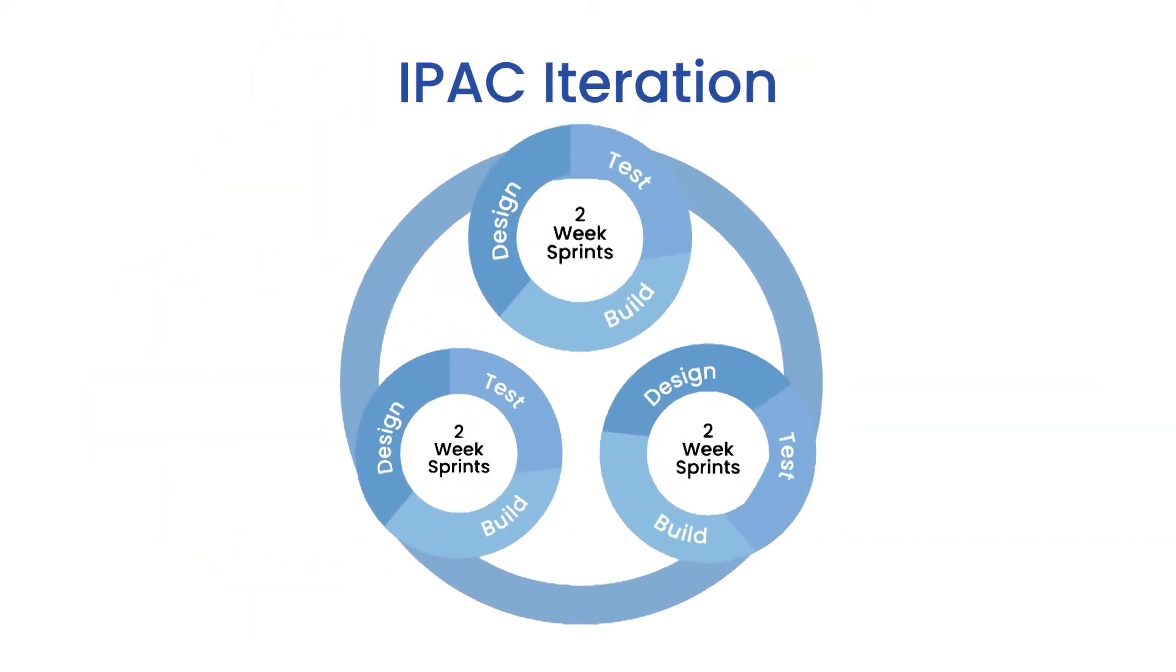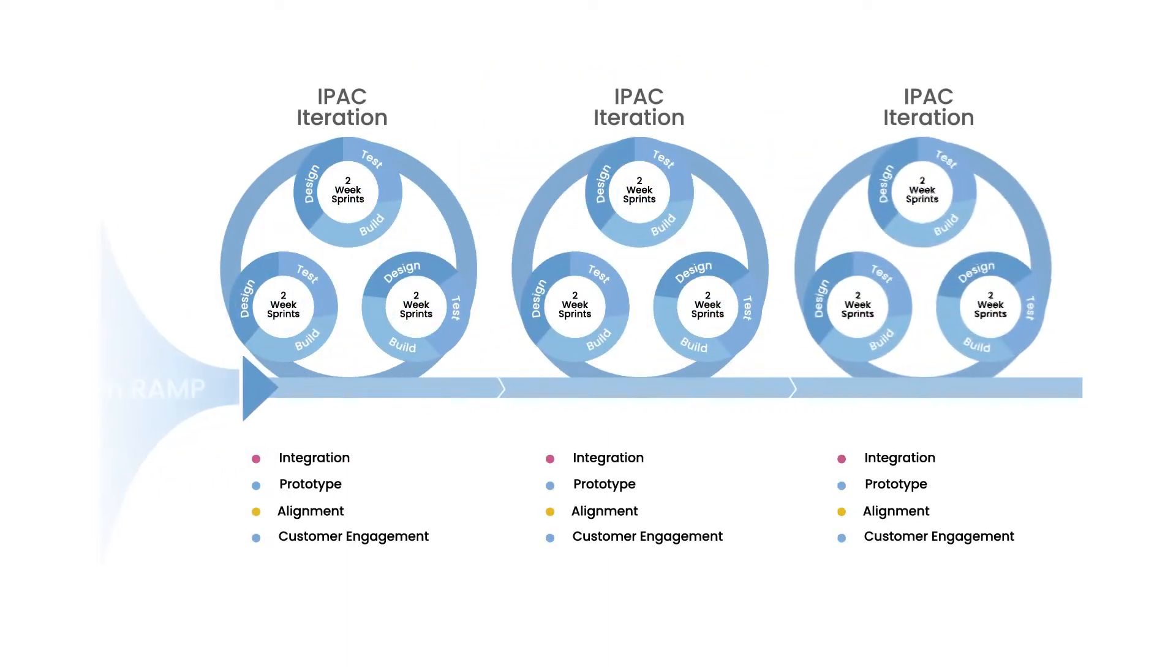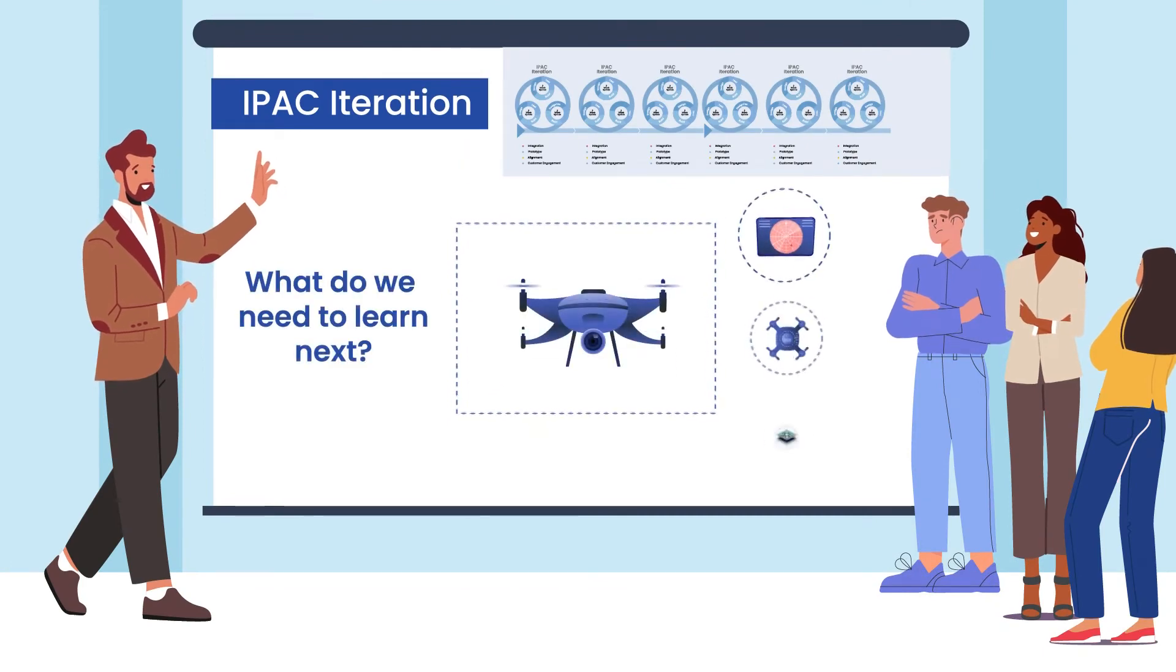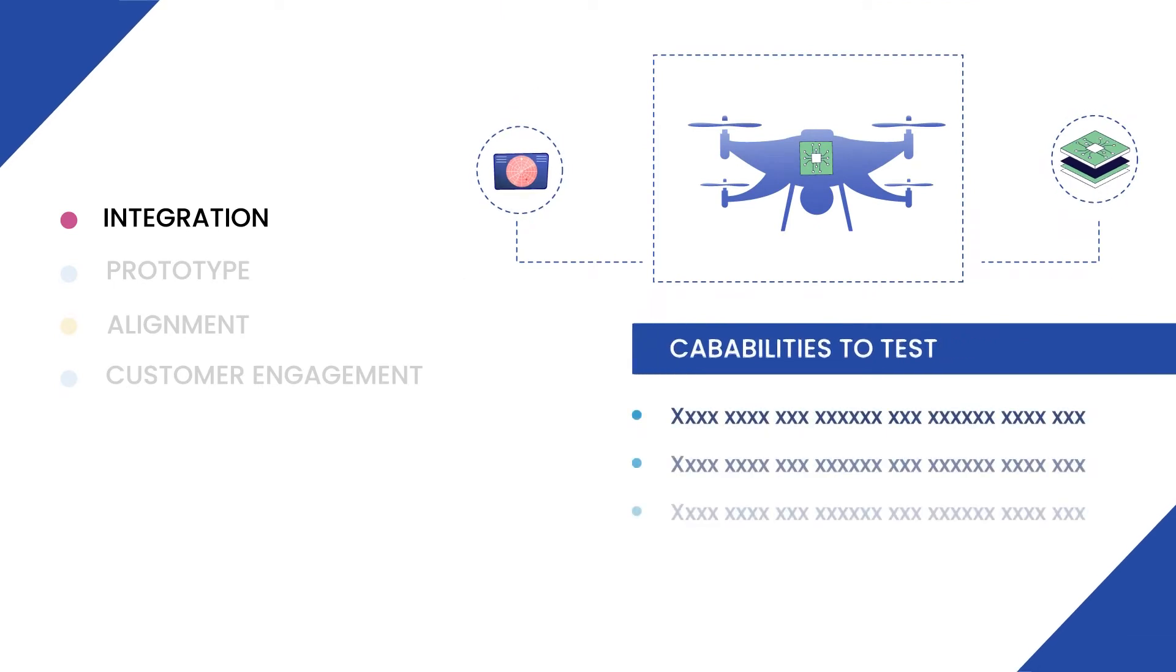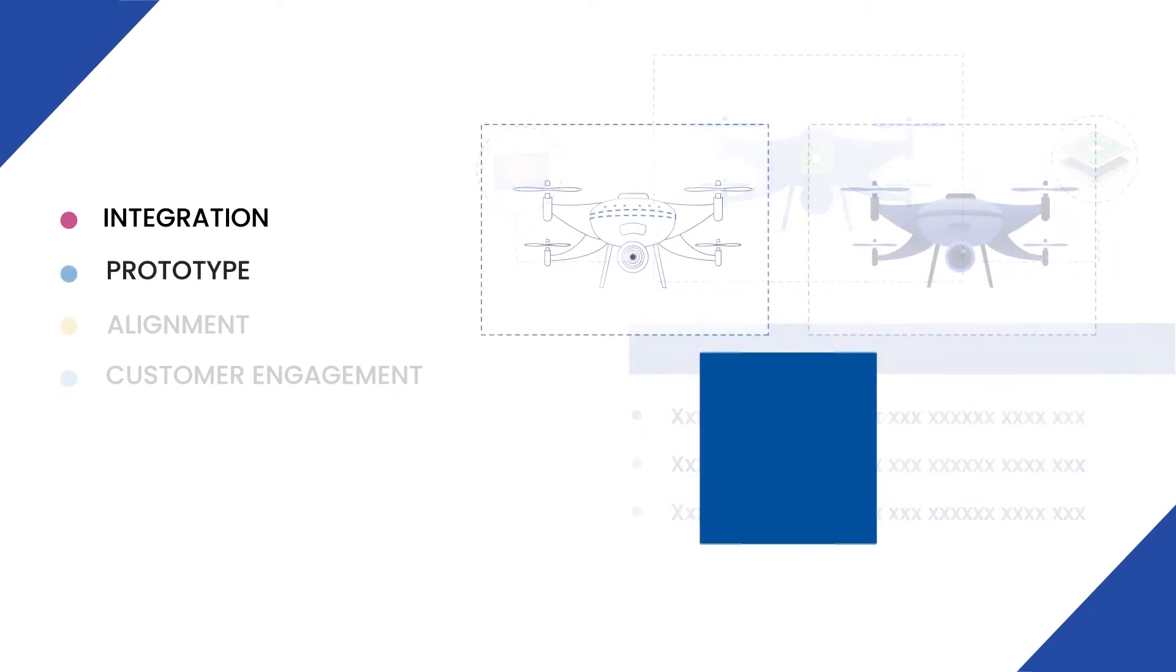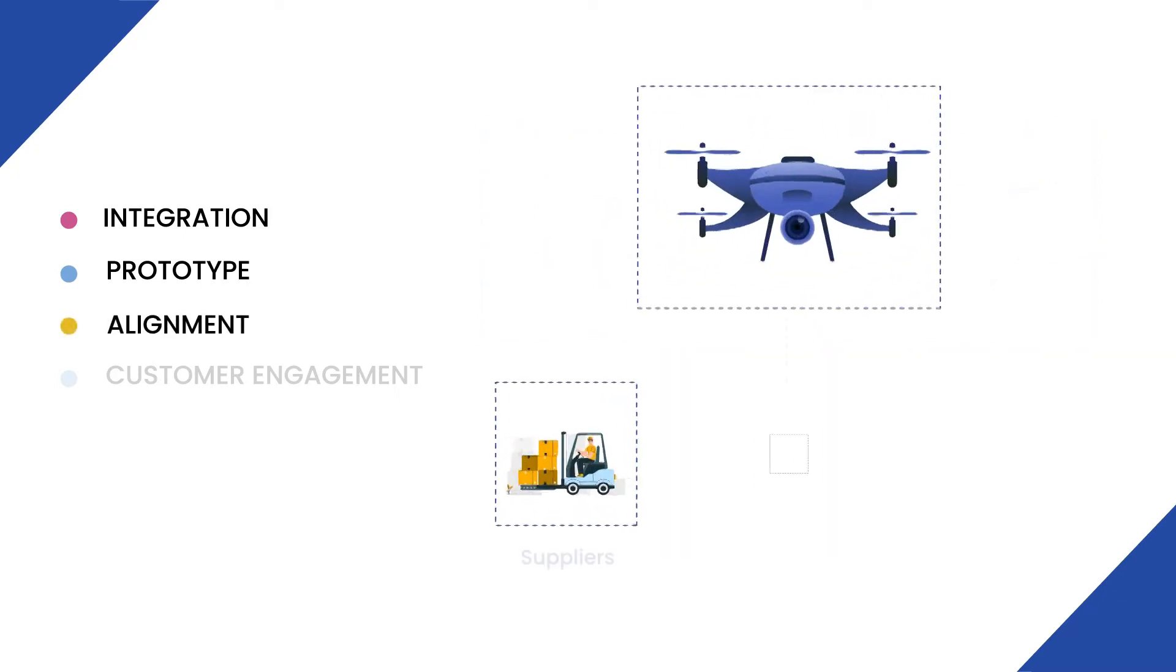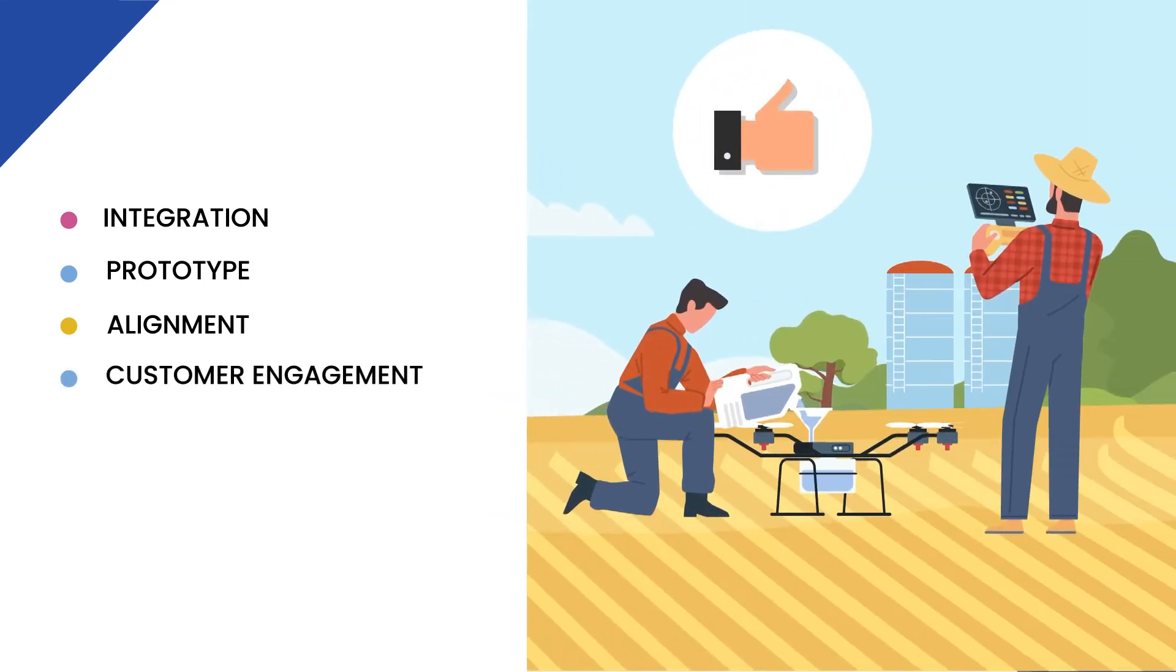At the core of the MAD framework, the flexible iteration plan guides the team toward project success. With each IPAC iteration, teams work toward a vertical slice of the system and establish milestones to integrate electrical, mechanical, software, and other elements. Work toward a demonstrable outcome as some form of prototype. Build alignment with all stakeholders, including external suppliers, and gain valuable feedback from customers.